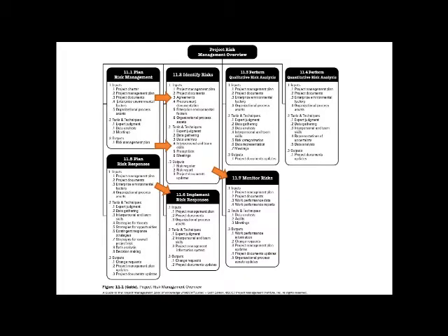Project risk management, a new process, implement risk responses, as I mentioned. Agreements as an input to identify risks. Interpersonal and team skills, again, emphasized here. So under risk management, that comes up quite often, that we do not identify risks and perform risk analysis without bringing in the team, and our own facilitation skills are a key part of identifying and managing risks throughout the project life cycle.